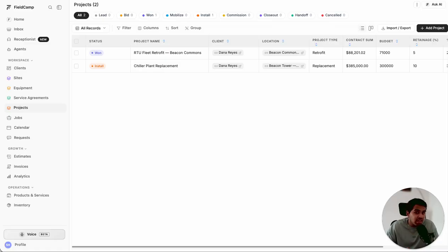You cannot just cram all of that stuff into one job, because then you will lose the phases, the budget, the ability to bill as the work completes instead of all at the end.